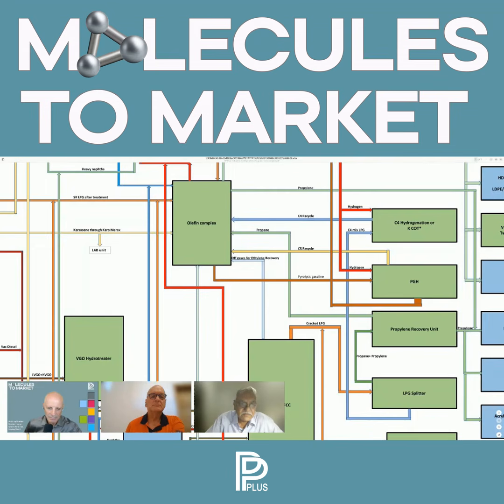Even if the owner is directly doing the technology selection, the consultant must be in position so that they can obtain utilities and offsites data and figure out the design of the utilities, the offsites, the power plant, CBFC, and so many other things. All these things can be done by the consultant to size them, because we have to get to the cost.